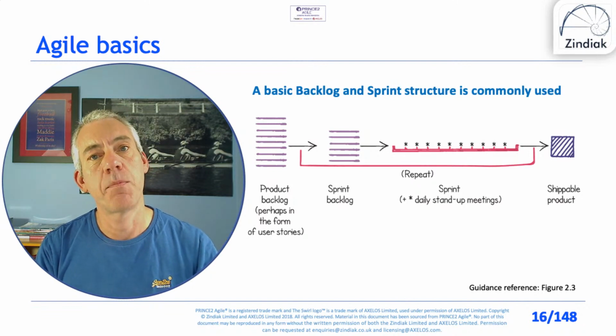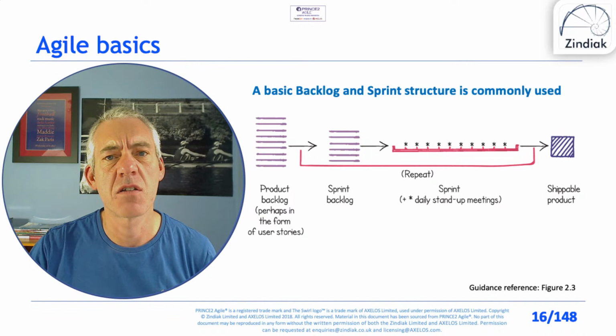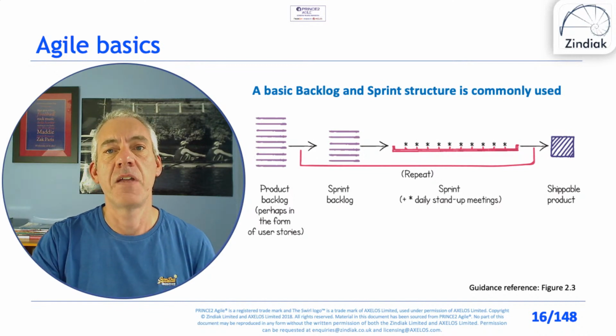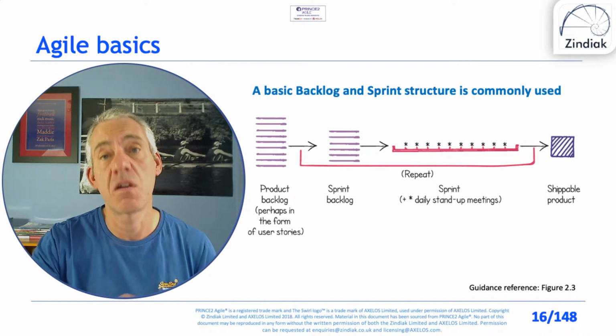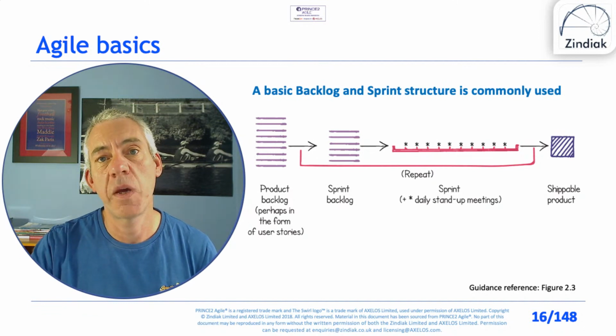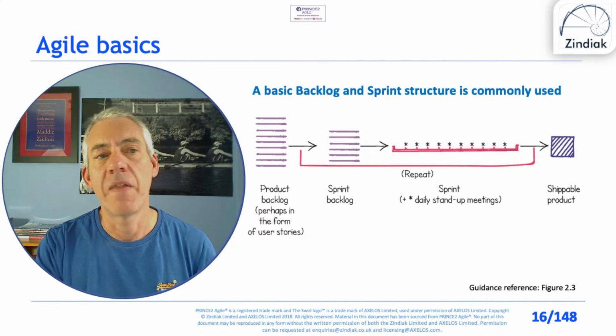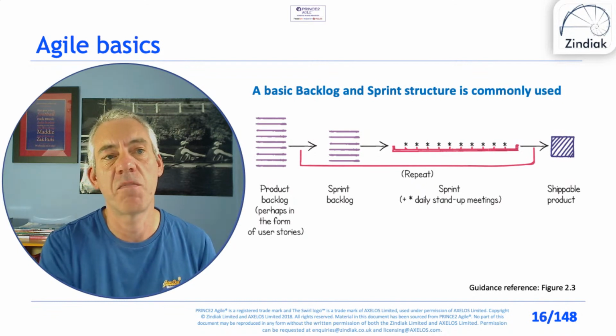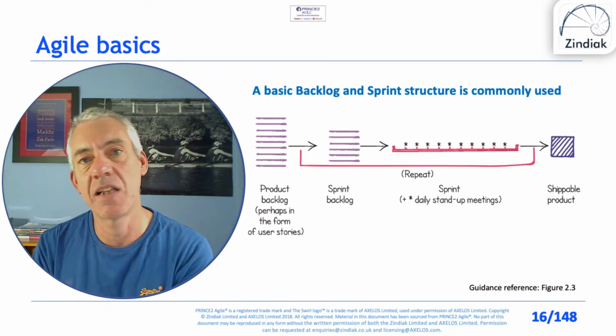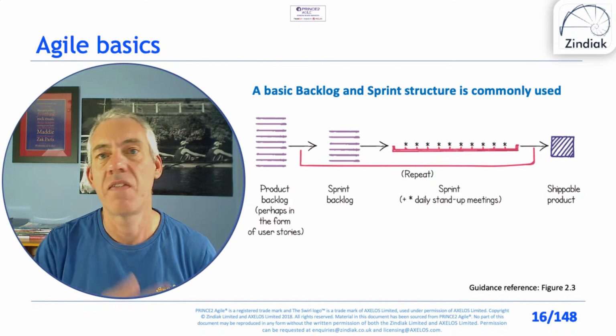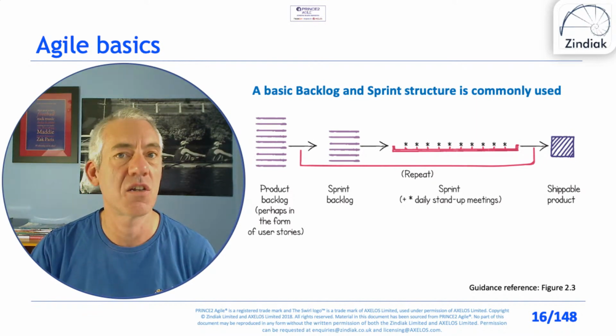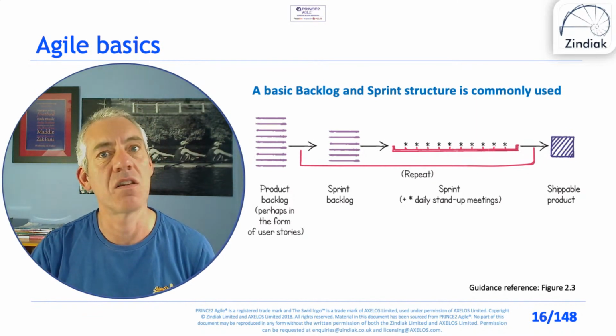They're not really being agile. They say, oh yeah, we have week-long sprints. But what they mean is they do a week's worth of work. They're having stand-up meetings, and at the end of the week, they review what they've done. But there's no real prioritization of picking a sprint backlog and trying to deliver at the end of the week. They're just monitoring how much they're producing each week, which isn't the point of Agile.